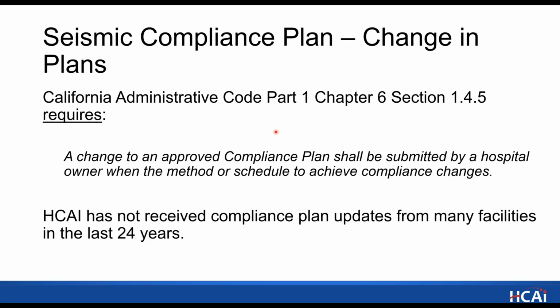This requirement has been around for a long time, and we have not received many updates from many facilities. So a deadline was put in place to get all the updated information. If you have submitted an application in the past, 2002, 2005, or whenever, it needs to be updated, and the due date is at the end of this year.